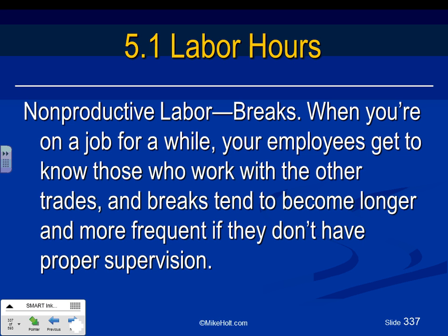Breaks get longer when the project gets longer, right, Jeff? Now you know the plumbers and the heating and cooling guys, and you've made friends on the side, so your breaks might take longer. So you have to accommodate for that one. If the project is getting longer, you get to know the people, and if you don't have direct supervision, guys, for project managers, I mean, when you have 10 electricians taking 5 minutes each extra on their breaks, it adds up. I don't like to say do that, but you have to kind of watch that.